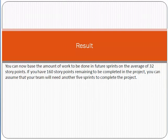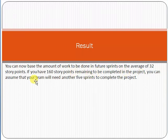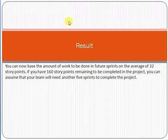What is the advantage of calculating sprint velocity? You can now base the amount of work to be done in future sprints on the average of 32 story points. If you have 160 story points remaining to be completed in the project, you can assume that your team will need another five sprints to complete the project. That is the main concept of sprint velocity.